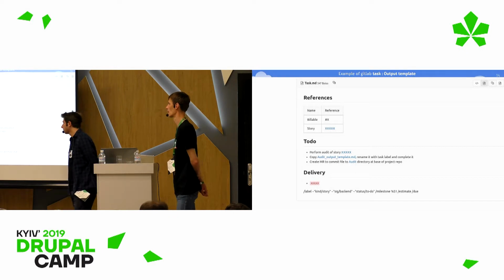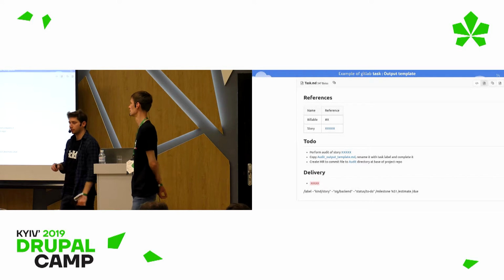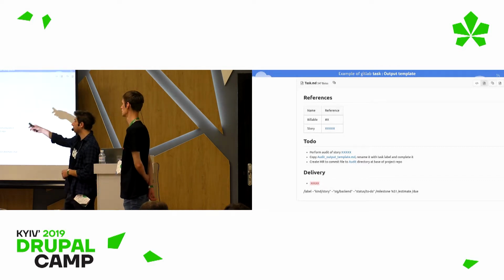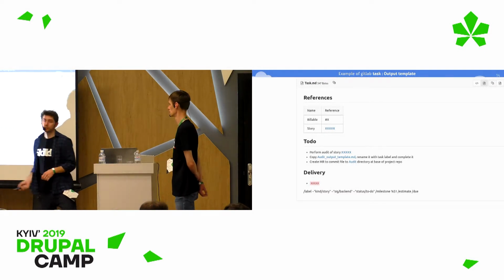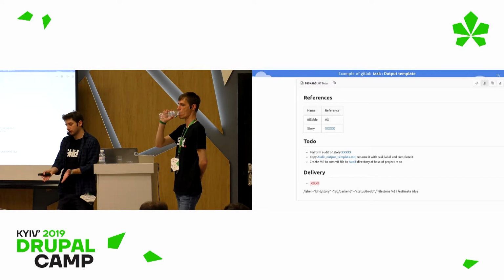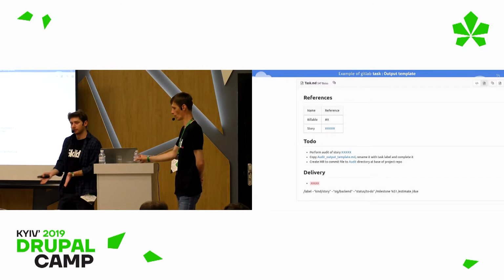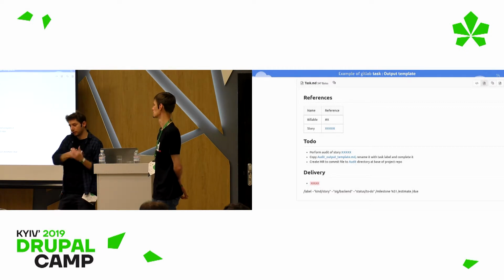So basically, a few more screenshots. This is the task template that we use for conducting audits. All the task is doing is just referring to one of the user stories that we wrote previously with the acceptance criteria, and we just say, hey, developer, can you check this? And that's it. This is the scope of the task. It is very small, so it can be delegated to junior developers, and we can spin up many developers at the same time, updating different things.